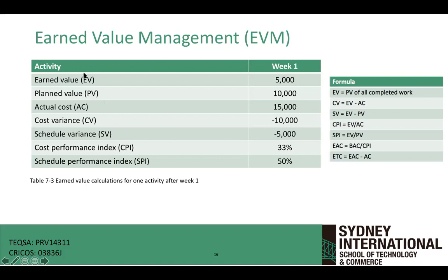So when you compare my earned value minus planned value, which is this formula here, I can know whether I am ahead of schedule or behind schedule. Anytime I compare earned value to planned value, it basically gives me an estimation of how I'm doing from a schedule perspective.